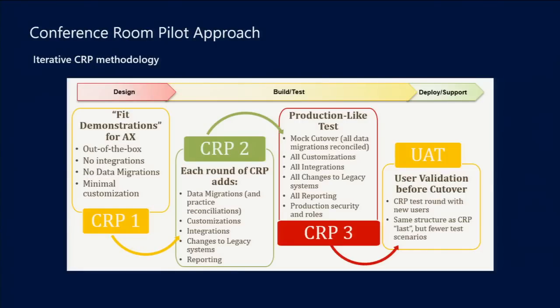Now, I like to bite these off in smaller chunks as opposed to doing the whole end-to-end process. So one day you may focus on procurement. The next CRP you may focus on sales order processing. Then you may take a look at the manufacturing process, and I'm going to fall off the stage in a minute. So once we've got that CRP in, once we've got it defined, we then go away and we test.